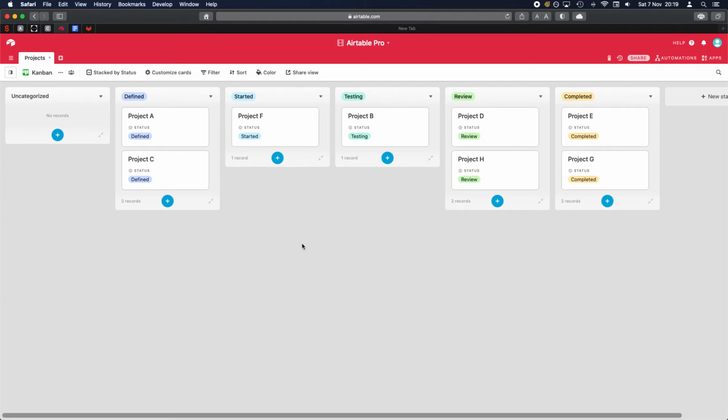The Kanban view is often used in many businesses, but it can be used in things like software engineering to track particular tasks over time. For example, you have a new piece of work you need to fix, like a new bug, and you can track its progress over time. So, in development, testing, review, and then deployed. So the Kanban view is really useful for tracking progress of things, and it gives you an overall view of the status of different things, and nicely groups them all.